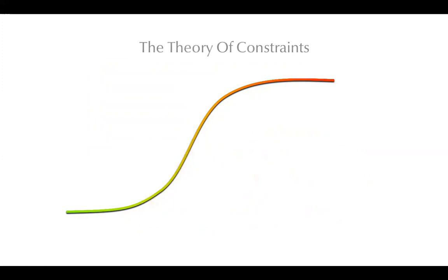It just says that in any process of production, there are many constraints, and there's always one constraint that is the bottleneck, that is the dominant constraint. And if we work on anything else, we're not going to be able to increase throughput. We have to work on whatever constraint is currently the bottleneck constraint.